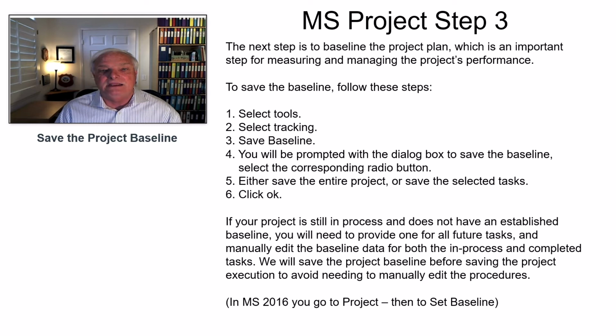Now, step 3 is to save the baseline. Follow these simple steps: you go to Tools, you hit Tracking, you do Save Baseline. You're going to be prompted to give a name to the baseline because you may create multiple baselines as you're moving along. You may want to have different names for them, and when you're done, you click OK. Now, if you're using a newer version of Microsoft Project, you go into the Project tab, and then you go to Set Baseline, and you'll see that you can set a baseline or erase a baseline. That's the difference between these two.